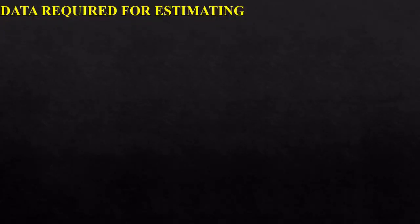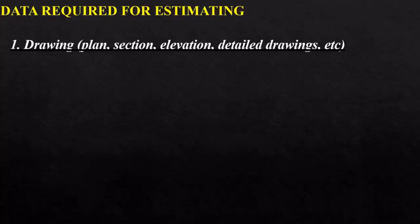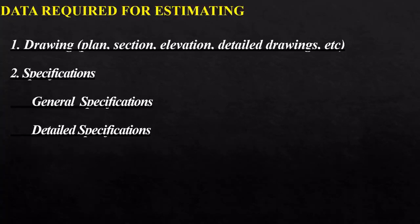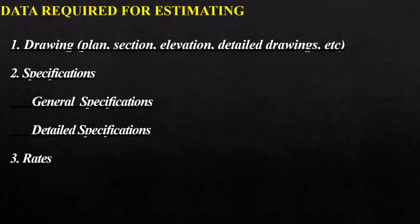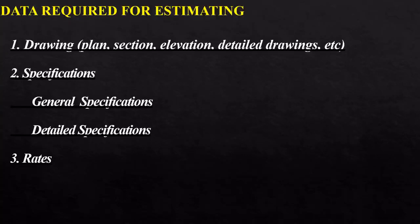What data do you require for estimating? The first data for cost estimation in a construction project is the drawings — you need the plan, section, elevation, and detailed drawings of your project. The second data required is the general and detailed specifications of your project. The third data required is rates — unit rates for every resource, rate for land acquired, etc. — the rate for each and every element involved in the project.